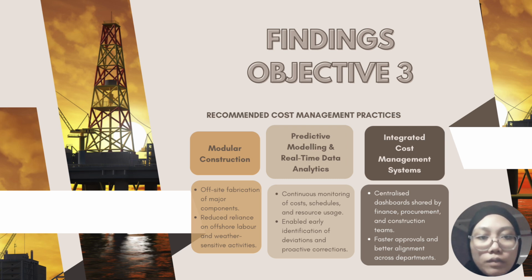So I will present about recommended cost management practices. Effective cost management is critical for oil and gas projects to ensure on-time, on-budget and high quality delivery. Three key strategies stand out. First is modular construction. Fabricating components off-site reduces offshore labor dependency, minimizes weather delays and improves safety. For example, the Kashagan project successfully used modularization to overcome extreme ice conditions.